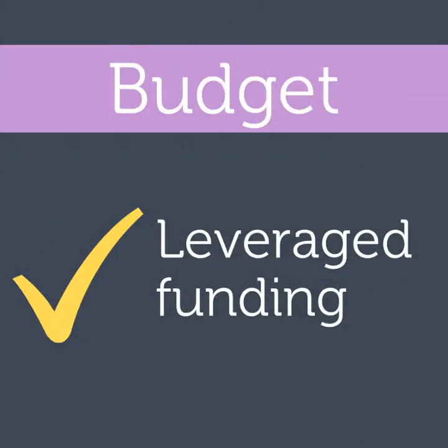Now, leverage funding. So make sure that you look at the guidelines. Each grant is different as to how much leverage funding they might require, which means how much money they require you to put in or somebody else other than the grant funding body. In the case of REDS, it's about 30%, minimum 30% that you need to put in. But speak to your Regional Development Commission if that is not something that you're capable of.